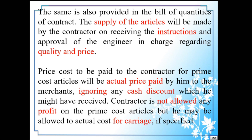The price cost to be paid to the contractor for prime cost articles will be the actual price paid by him to the merchants, ignoring any cash discount which he might have received. The contractor is not allowed any profit on the prime cost articles, but he may be allowed the actual cost for carriage if specified.